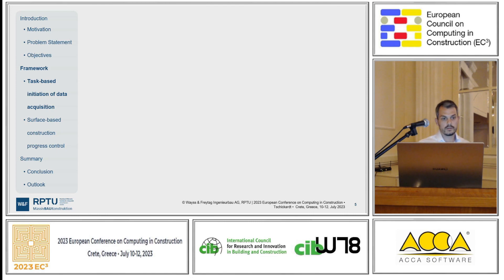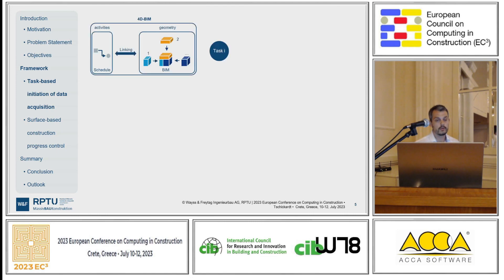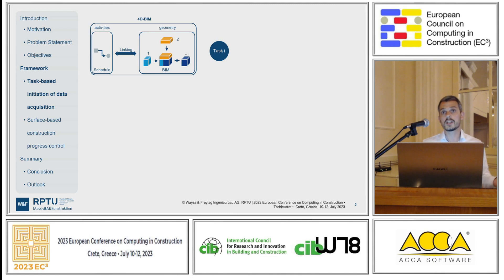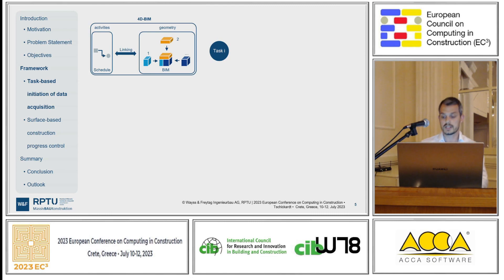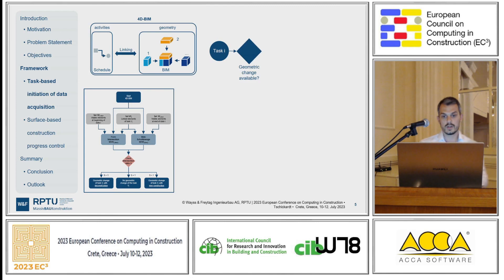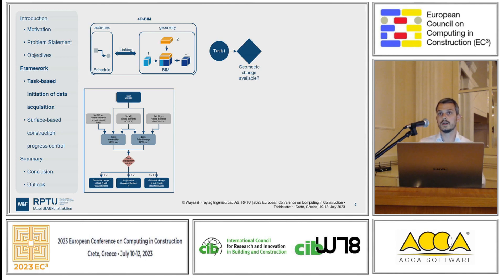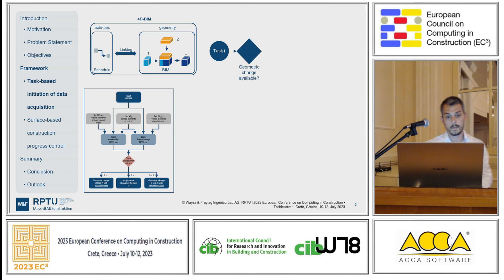Let's go to the task-based initiation of data acquisition. The beginning of my framework is the 4D BIM, which can consist of more than one partial model — I'm not focusing on one IFC file. I start with the evaluation of a task within the schedule, which is in the domain of activities, and I run an algorithm which checks if the task creates a geometric change. For example, if I have concrete work, the actual concrete geometry is a change, but if you do the finishing after stripping of formwork, only the finishing — there's no geometric change available. If there is no change available, no data acquisition can be done.